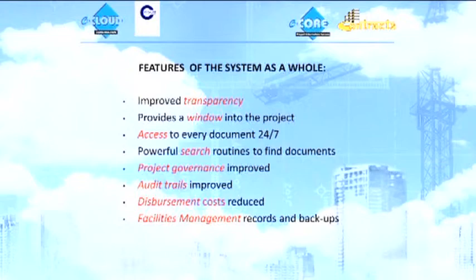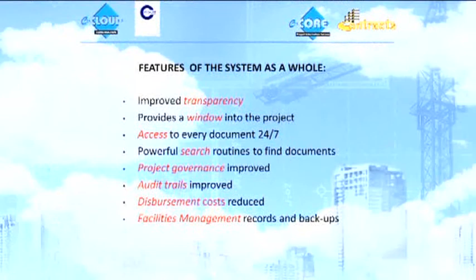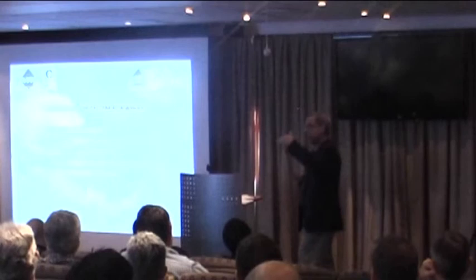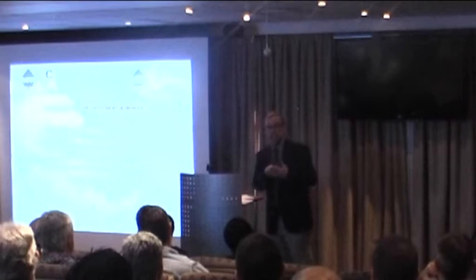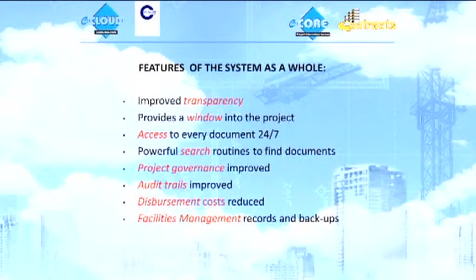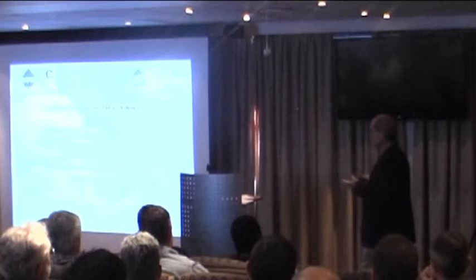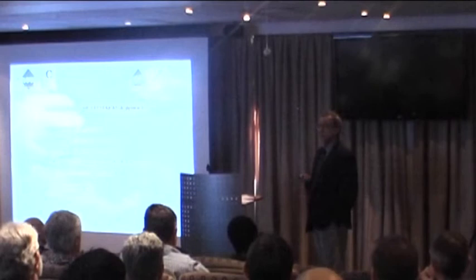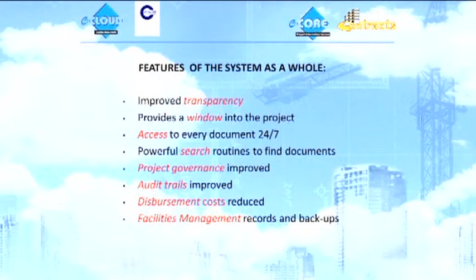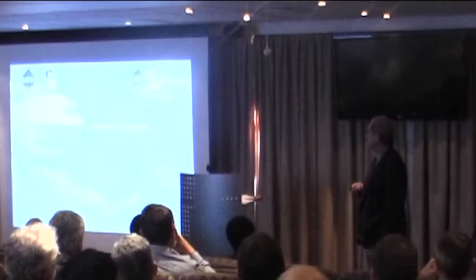So just in general, the system as a whole improves transparency. Anyone can look into the project at any point in time, including the client, and see exactly what is moving around, what questions are being asked. It provides a window into the project. It allows that access 24-7. There are powerful search routines. Project governance is substantially improved. So if the STP folder is empty, but there's a set of site handover minutes going into the site handover minute folder, I'll be handing out a site without an approved STP. Audit trails are improved. Disbursements cost is substantially reduced. We did a project recently—we're on one project, a fairly large project—overall disbursements budget reduced by about 350,000 just in a number of people in the team that no longer printed every drawing. And facilities management records are kept on the system and are easy to access and find.